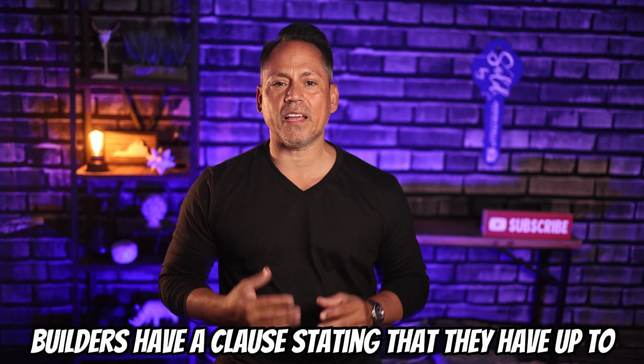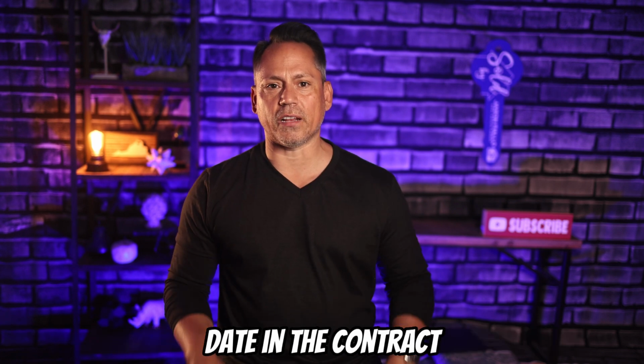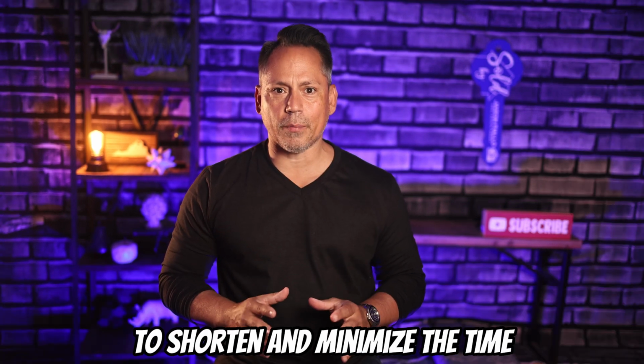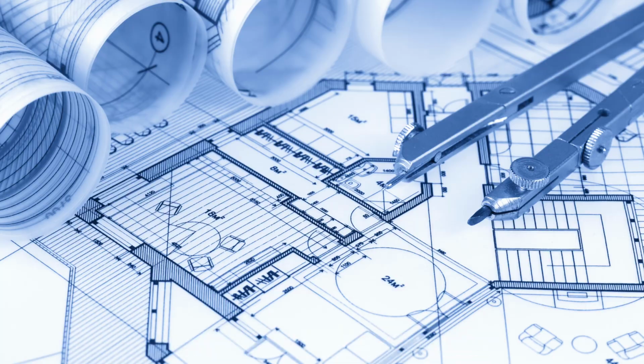One thing to note, in Virginia, builders have a clause stating that they have up to 2 years to complete a new construction build, despite stating a target completion date in the contract. Typically, if delays are experienced, builders do their best to shorten and minimize the time because the house has to close on the sale in order for them to get paid.